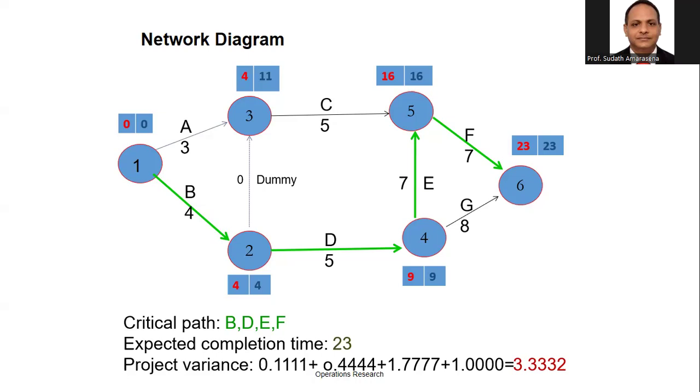If you want to identify the probability, now we should identify the standard deviation. How to calculate the standard deviation? It is the square root of the variation. You take the square root of 3.33. That's what we call the standard deviation. The total variation, considering that figure, get the square root. We call this the standard deviation.